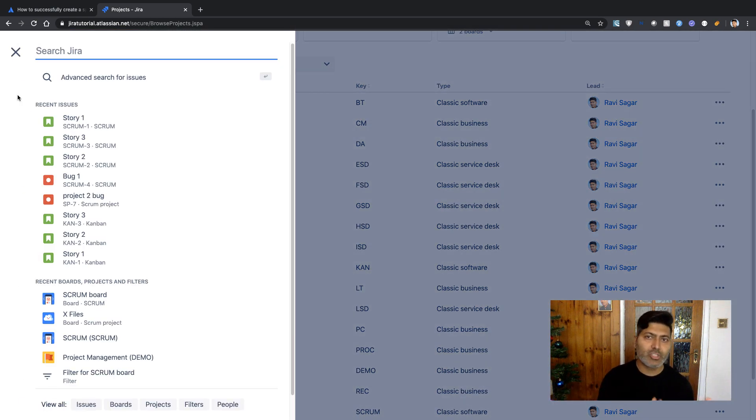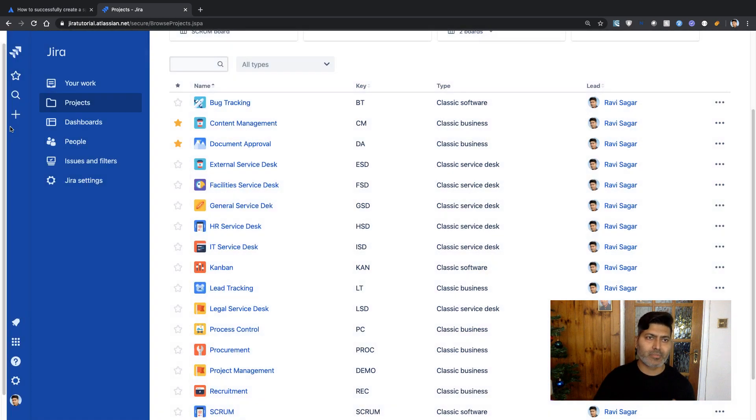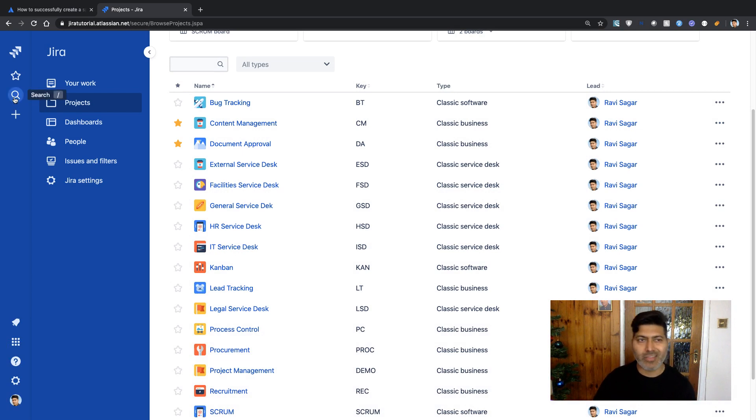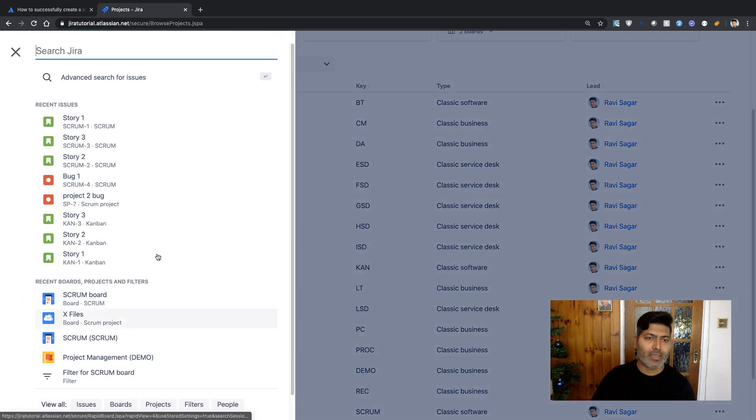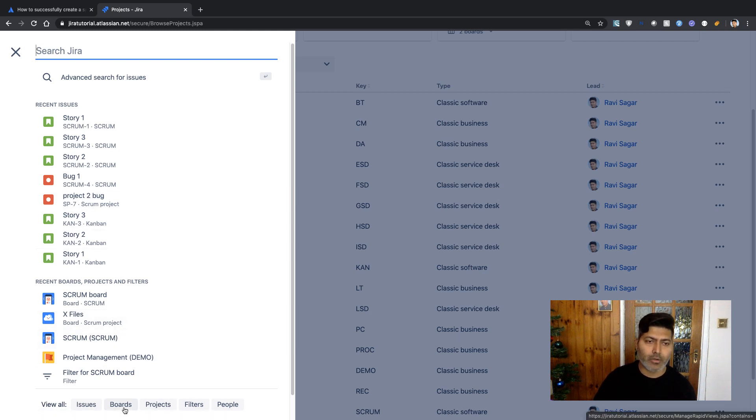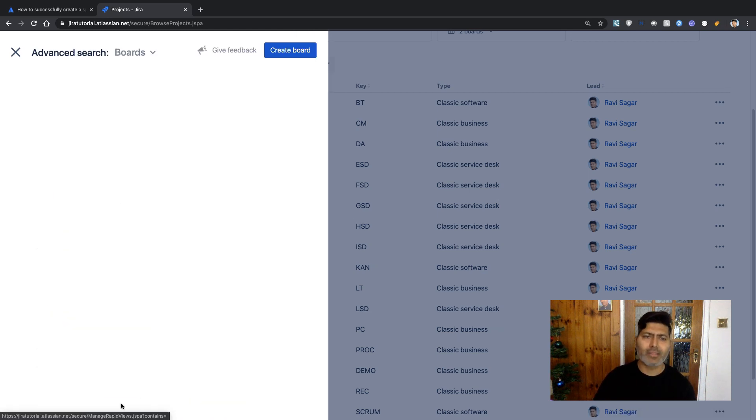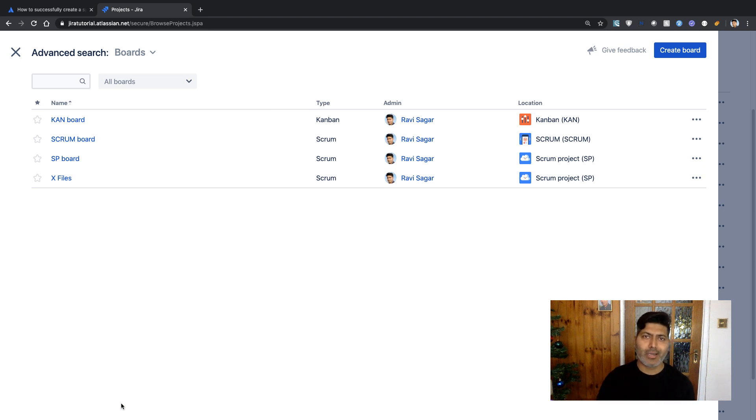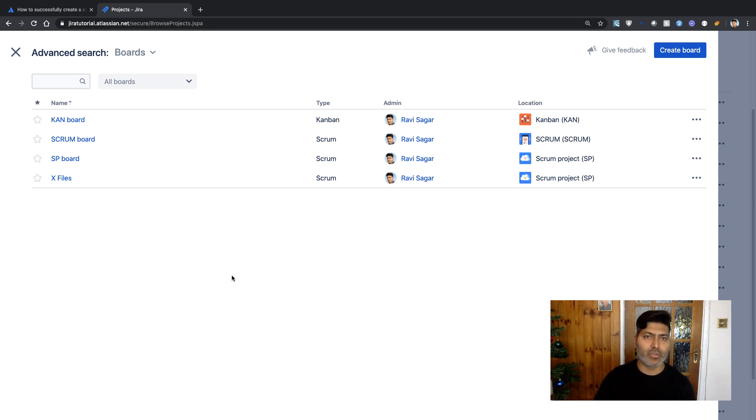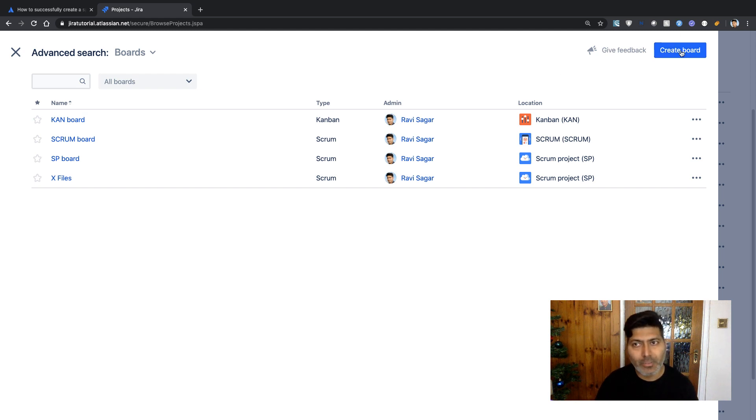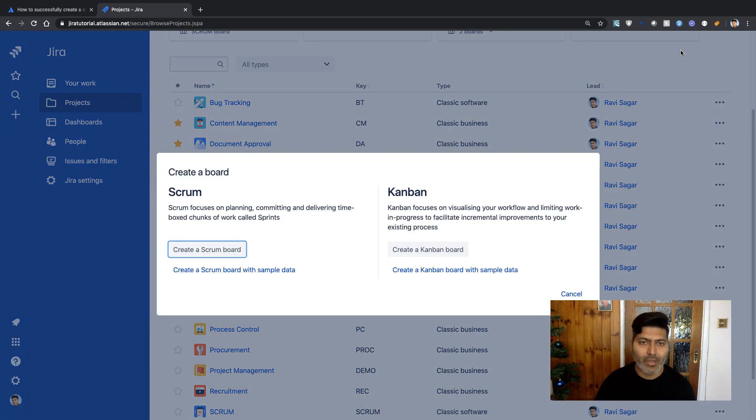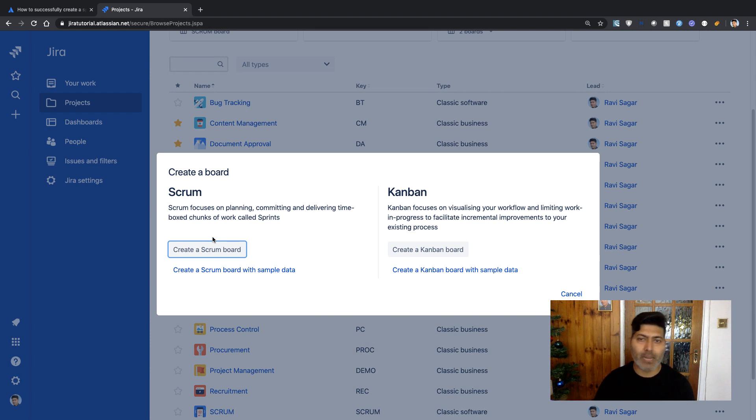To do this, you first need to create a board. If you go to search Jira, there's an icon on the left-hand side. If you click on it, you'll notice an option called Boards. Click on Boards and you'll see all the boards in your Jira instance. We're using the cloud version, so you can click the button on top called Create a Board.